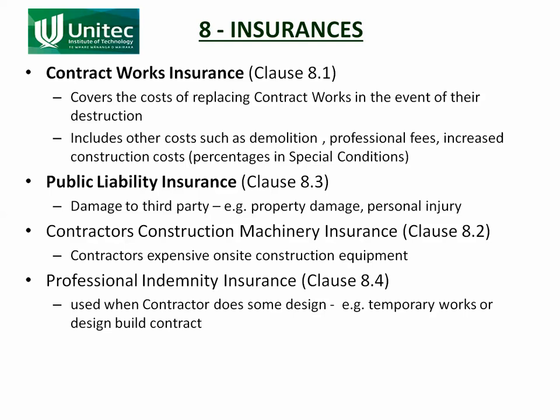Another type of insurance is covered in Clause 8.3: public liability insurance. This is damage to a third party — someone not involved in the contract, such as a neighbour. A situation I've seen was when they were excavating a basement for a hotel right up to the boundary line, and the house next door started to slump and was damaged because the excavation wasn't supported properly. The cost of that damage would have been covered by public liability insurance, which would cover rebuilding that person's house.